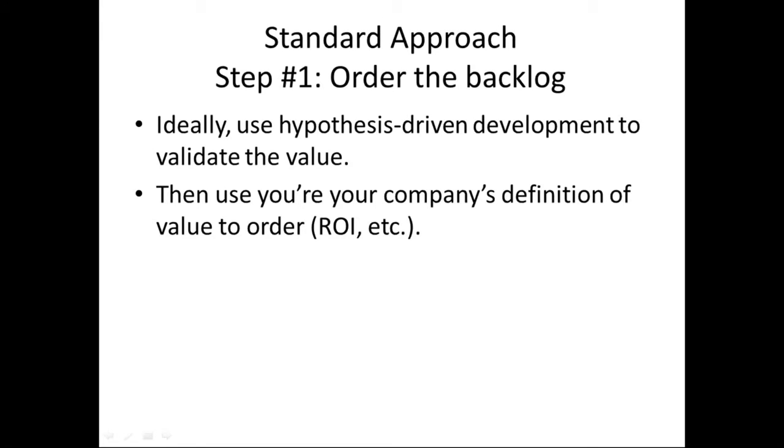And so when you don't do this, then you get this standard result that you've probably heard many, many times, which is that something like 2/3 of the features are not used or rarely used. So if you simply go to the customer and validate that a feature is going to be used and useful for the customer, you actually immediately triple your speed because you get rid of the 2/3 of the items on your backlog which have no value.